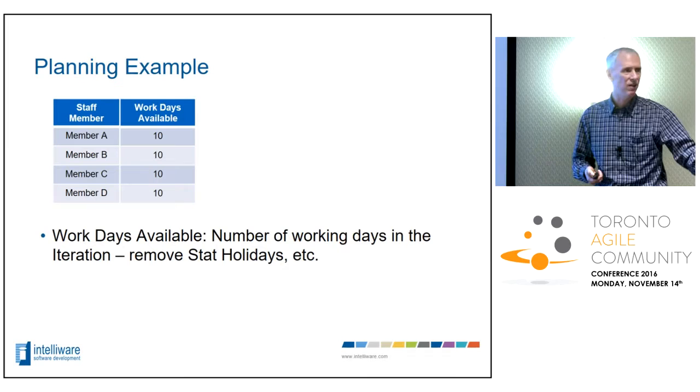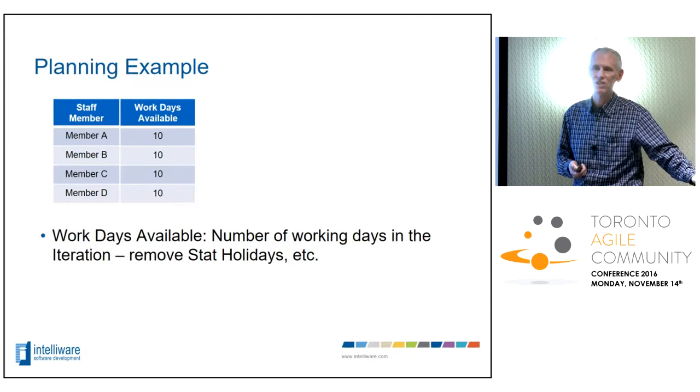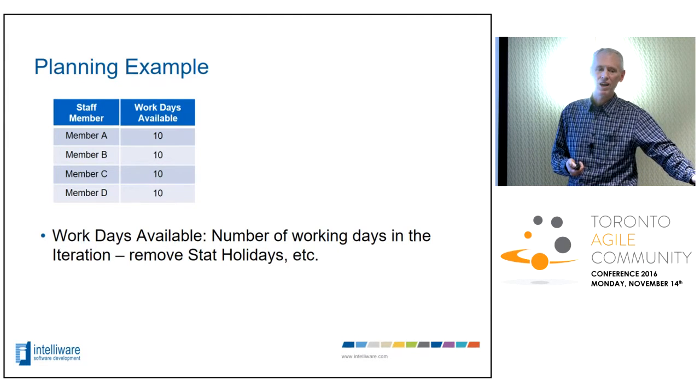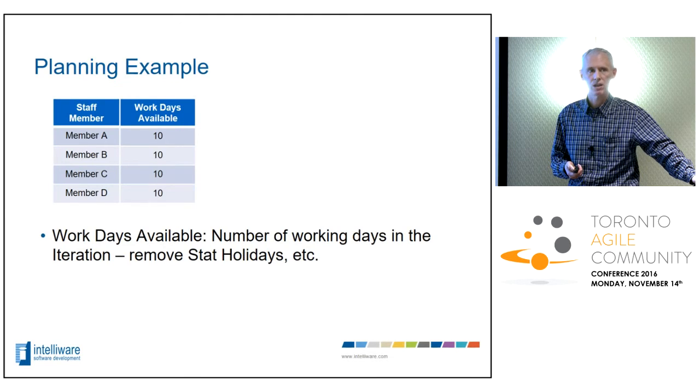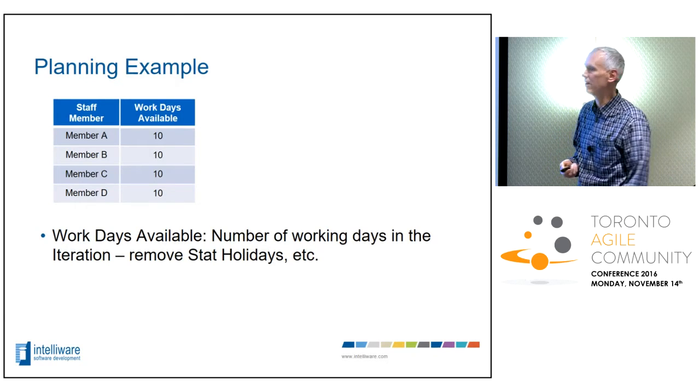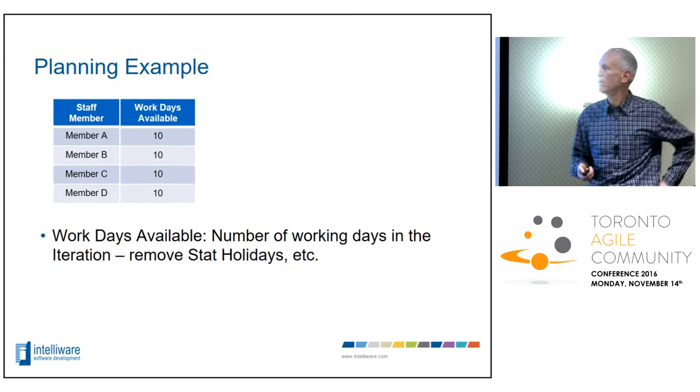This is often the way I find teams get burned: they don't take into consideration that they've got a stat holiday coming up in their 2-week sprint. They go out and plan 10 days, and then partway in they realize, oh crap, we can't get everything done. We don't have a day to work with. And that's important, right? That's 10% of your productivity there if you don't take that into account.